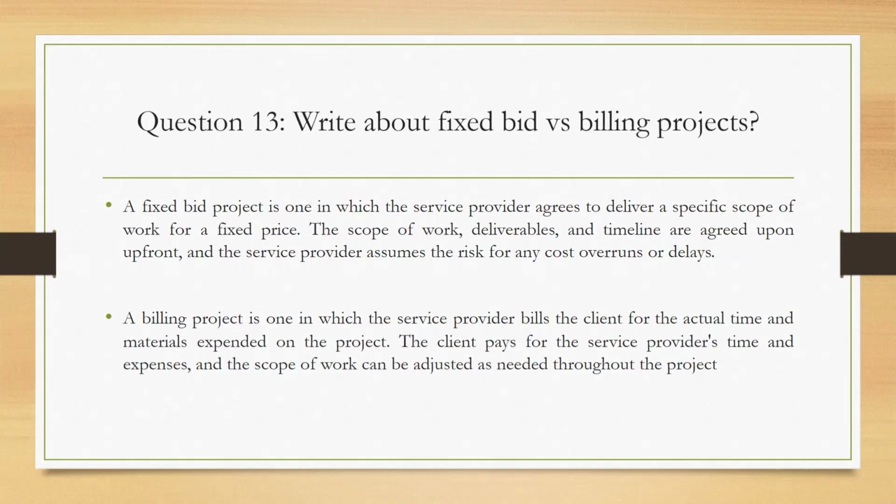For example, we have decided to give 500 rupees per day. So you will work 6 hours per day, and for those 6 hours, I will be paying you 500 rupees. For example, if you worked 2 more hours, like 8 hours, then I need to pay 200 more rupees. So here the risk will be more for the client, because he is just investing his time and the budget.